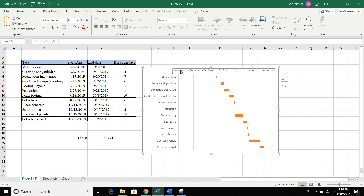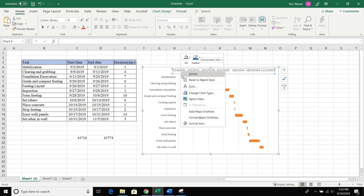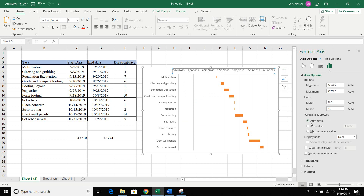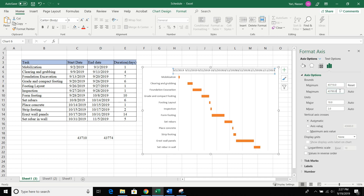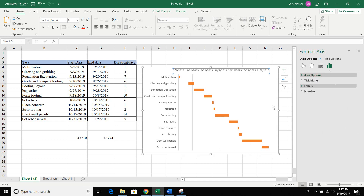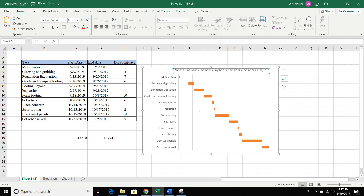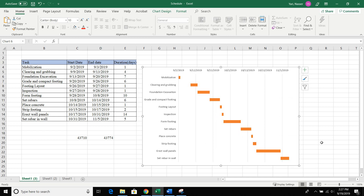Come back up to your graph and click on the date axis at the top — it shows dates like 7/14/2019. Right-click and select Format Axis. The Format Axis window opens showing the minimum and maximum boundaries. Set the minimum to the numeric value of our start date — 43710 — and set the maximum to the numeric value of our end date — 43774. Once you enter those values, you can see the space is gone and that's how our final bar graph looks. Good luck and have a wonderful week!